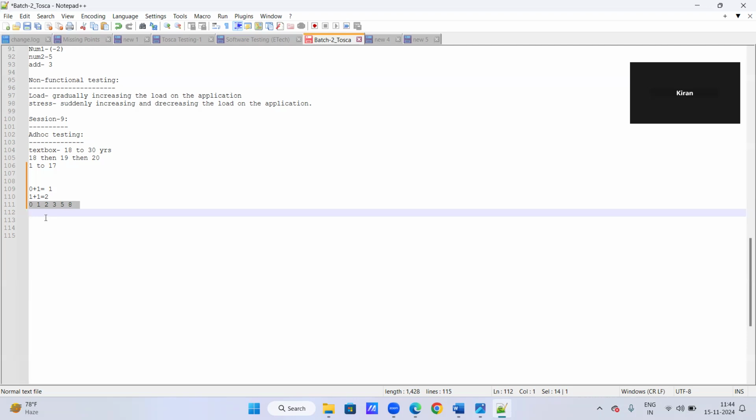Now suppose I have one story, a login story. For this, the developer gives some number and estimates how much time is required for development. Let us say the developer said 5. 5 means what? One story point is how much? 1 hour, right? And five story points means 5 hours, right? Did you understand, Kiran? Yeah, yeah. So the developer sends 5 story points. It means 5 hours.